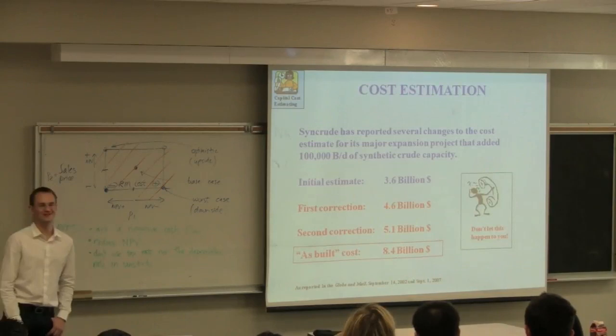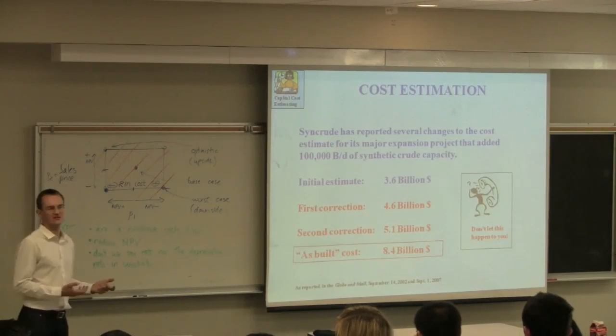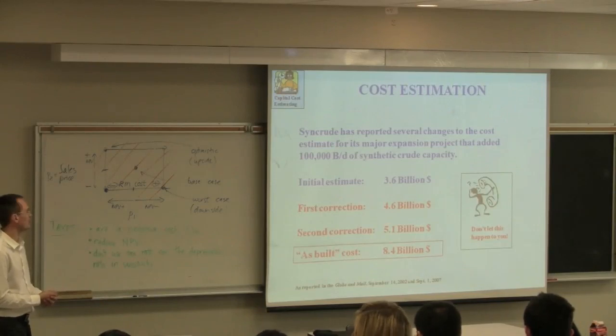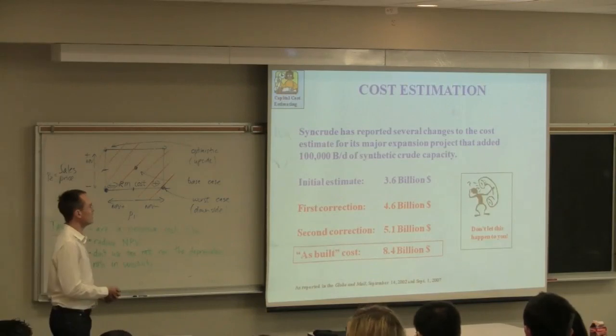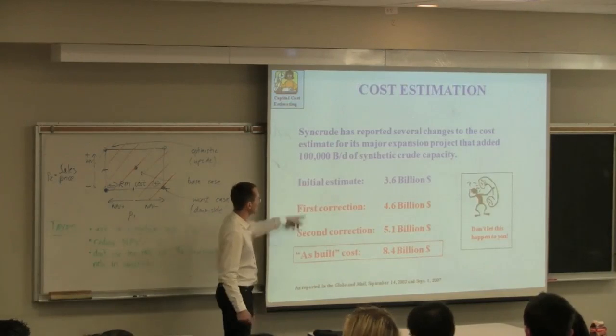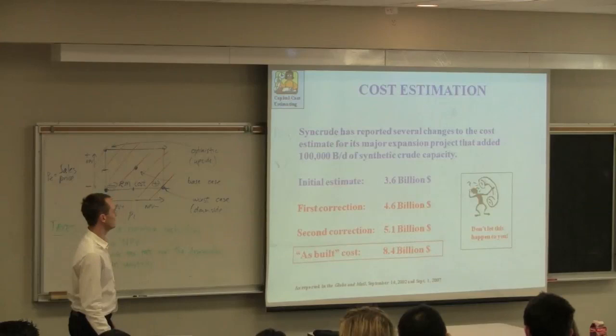Okay. I like Dr. Tamar's notation here. So don't let this be you that's the person responsible, partly responsible for this. We're going to see in this part of the class today, we're looking at these initial estimates. We're going to see that the estimate error is as much as 50 to 100%. It's not possible to make highly accurate estimates of these costs. So this is not too surprising. This is a fairly big magnitude, probably a little bit bigger than we normally have in terms of our errors.